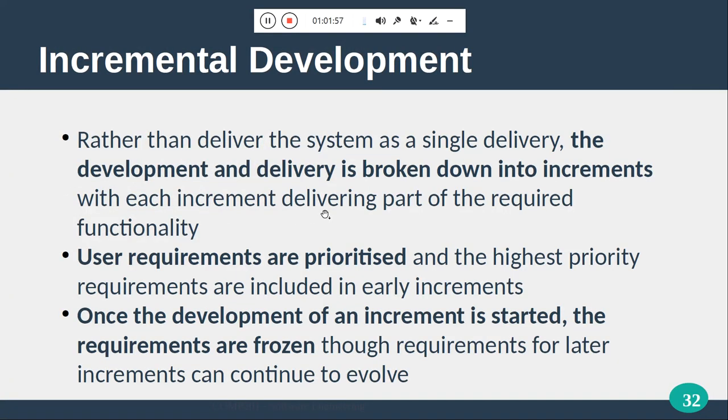And incremental development is that rather than deliver the system as a single delivery, the development and delivery is broken down into increments, where each increment delivers part of the required functionality. The user requirements are prioritized, and high priority requirements are included in early increments. Once the development of an increment is started, the requirements are frozen.